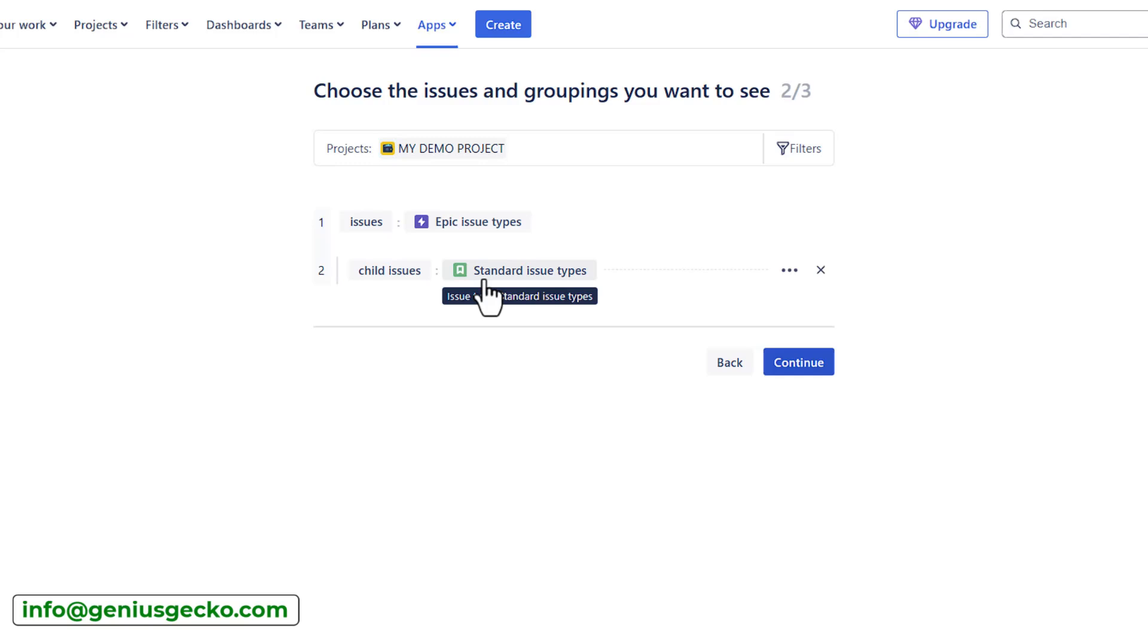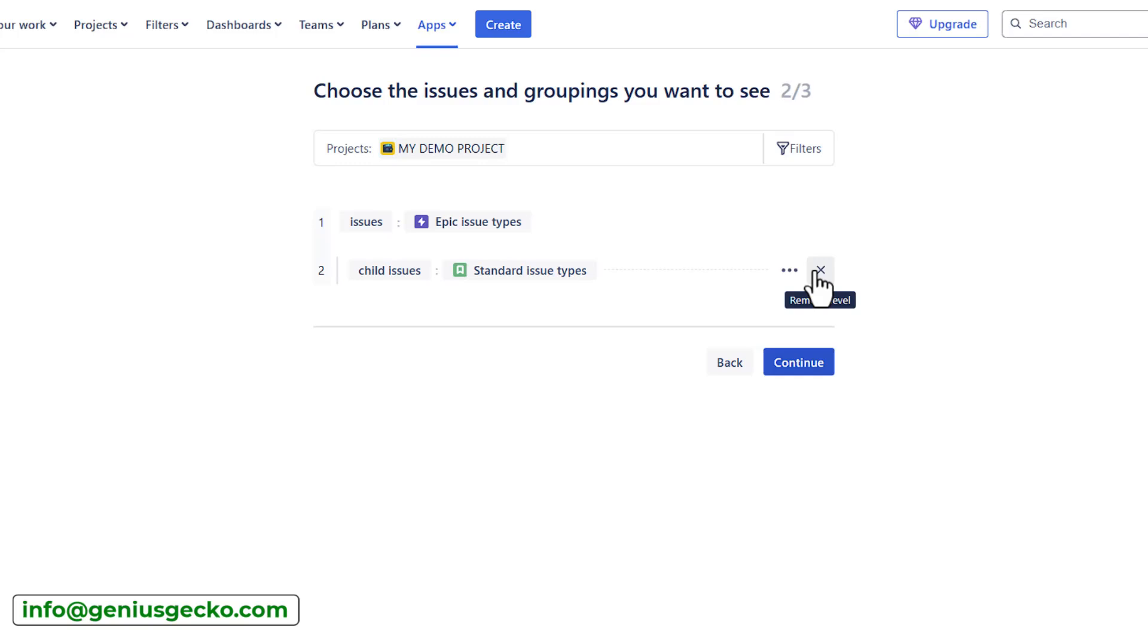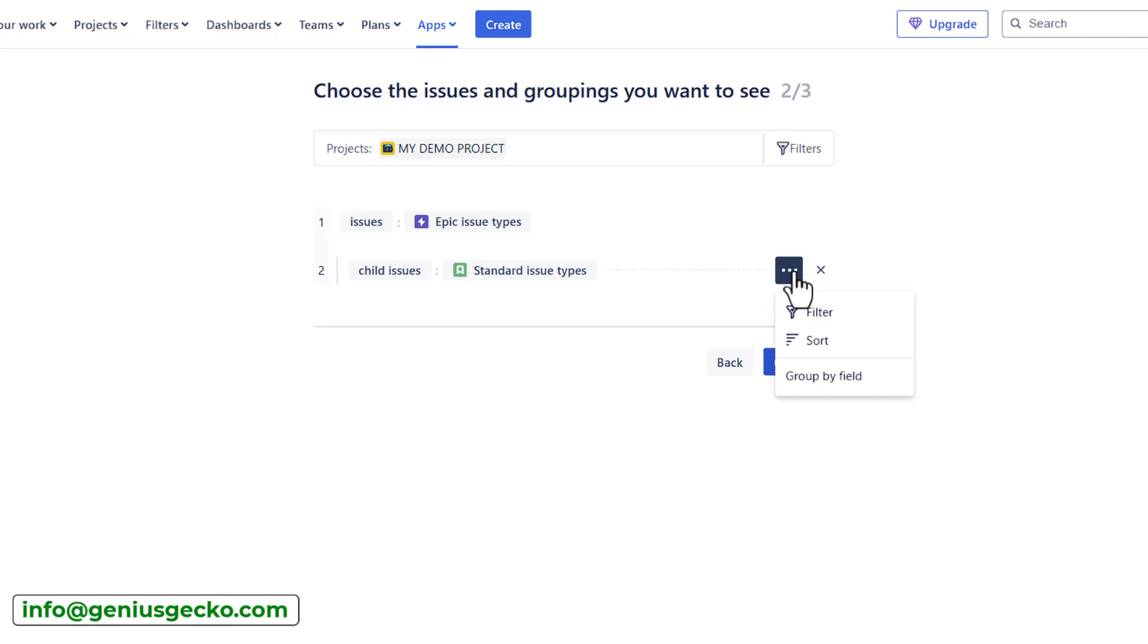However, if you have Jira premium or enterprise, you can customize it and have additional levels above the epics or in between the epics and the standard issue type. What can we do here? We can remove this level. We can also add filters to, for example, exclude issues that are already completed and focus on the remaining work or decide how we would like to sort our data. We will cover that in more details when we explore the power mode.